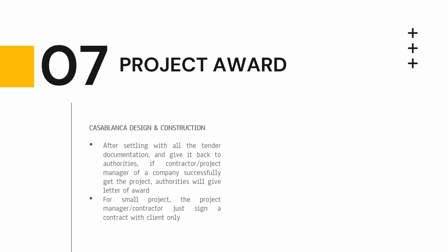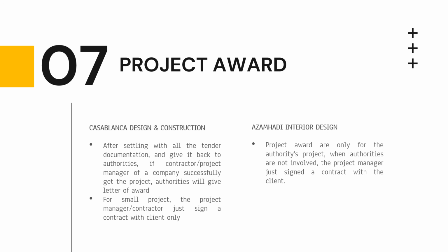For Casablanca Company, after settling all the tender documentation and giving it back to the authorities, if the contractor or project manager of a company successfully gets the project, the authorities will give a letter of award to them. For a small project, the project manager or contractor just signs a contract with the client only. Lastly, for Azam Hadi Interior Design Company, project awards are only for the authorities' projects. When authorities are not involved, the project manager just signs a contract with the client.